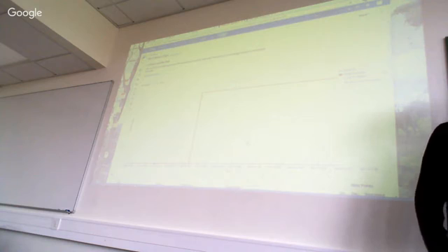There are two parts to getting this to work properly, more realistic and more the way it is. Number one is to have short tasks. If you have tasks that take the whole sprint, obviously there won't be anything completed until the end of the sprint. If you have short tasks, then you complete more tasks, and then you will have a gradual decrease in the curve.